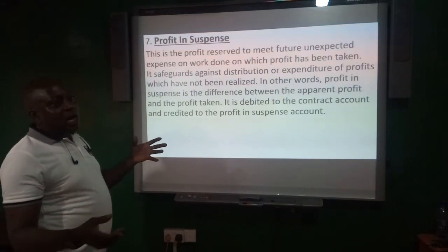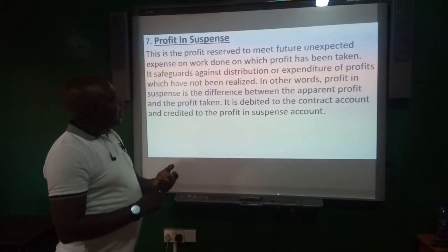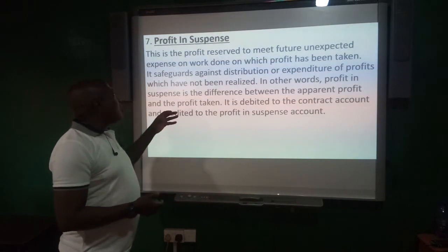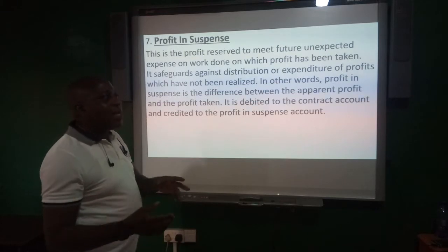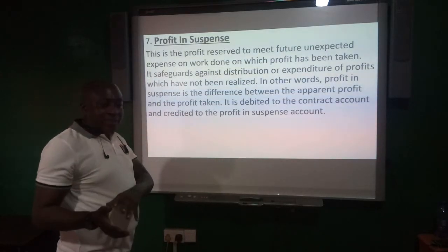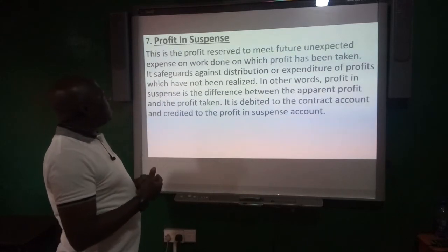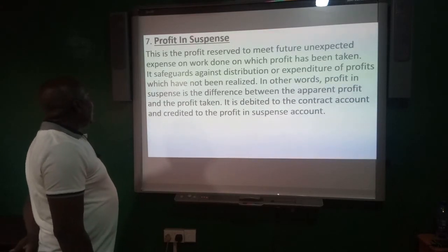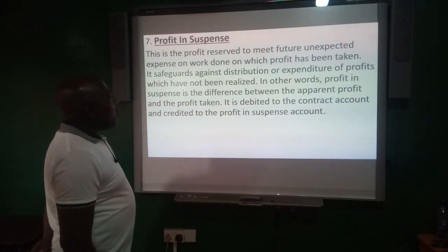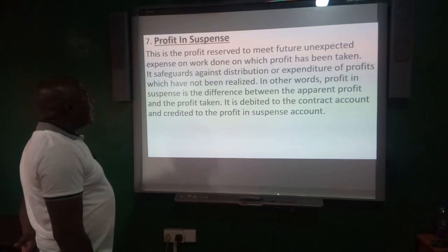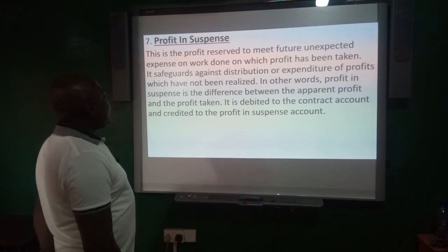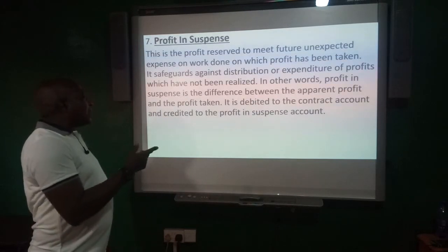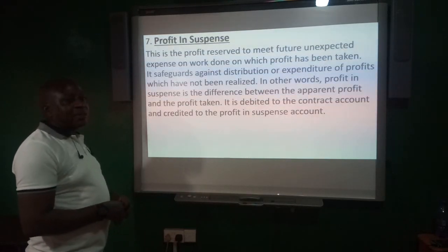And then as I told you, apparent profit is made up of profit taking and profit in suspense. So when you have taken profit out of the apparent profit, what remains is the profit in suspense. This is the profit reserved to meet future unexpected expense on work done, on which profit has been taken. It safeguards against distribution or expenditure of profit which has not been realized. In other words, profit in suspense is the difference between the apparent profit and the profit taken. It is debited to the contract account and credited to the profit in suspense account.